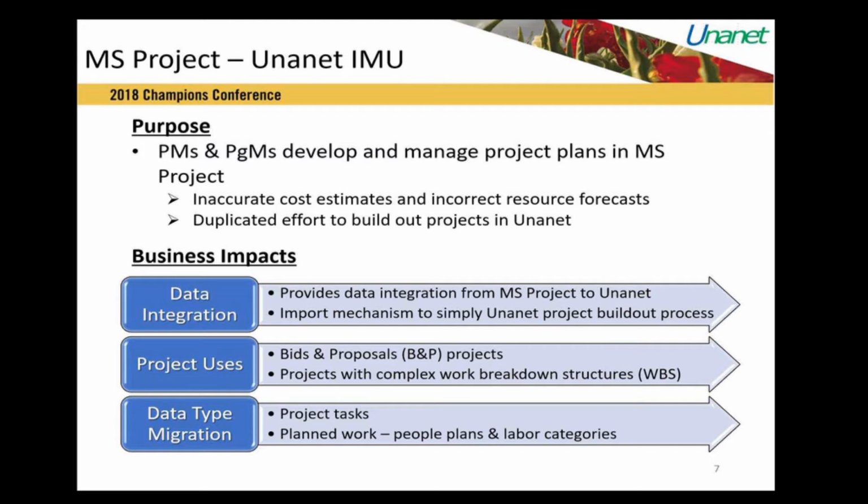And so the purpose of developing this tool was simply to quickly migrate data from one system into UNINET so that we could overcome what in many cases were inaccurate cost estimates and ultimately incorrect resource forecasts. And then we had the PMs who were also duplicating the effort in building these projects in UNINET, which was just a waste of man hours. So we developed this tool with Kent and his team again, which has enabled us to very quickly import data from the MS Project system to UNINET.